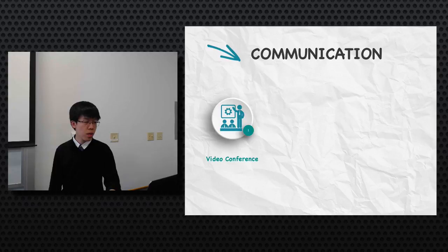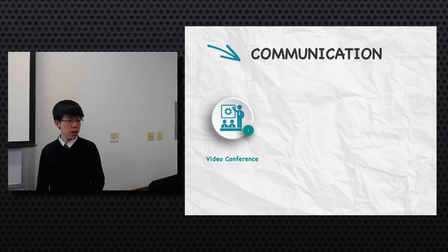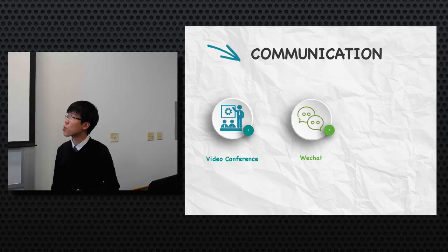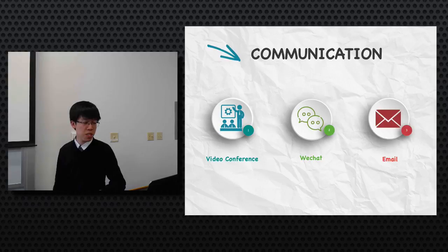We hold a video conference meeting via Skype with our client twice a week to ensure that we are on the same page. We brief them on our current progress with our translators and the issues that we're having so far and what they can expect from us. We also utilize WeChat as a tool because there are many instances where our clients need to reach us very quickly, and if we have any urgent issues that we need to forward to them, we would use WeChat. And of course, email. We didn't use email that much, but if we have important messages, we would use email.